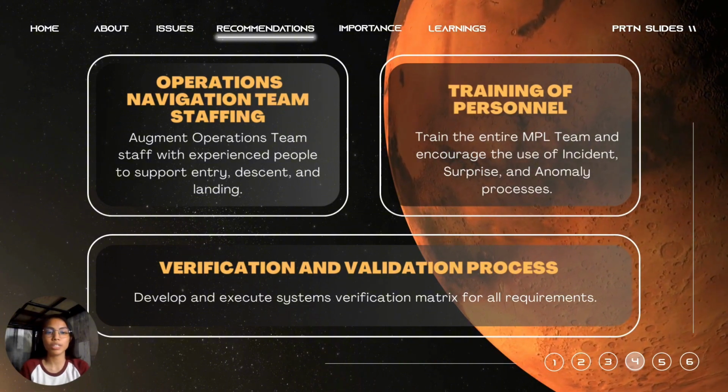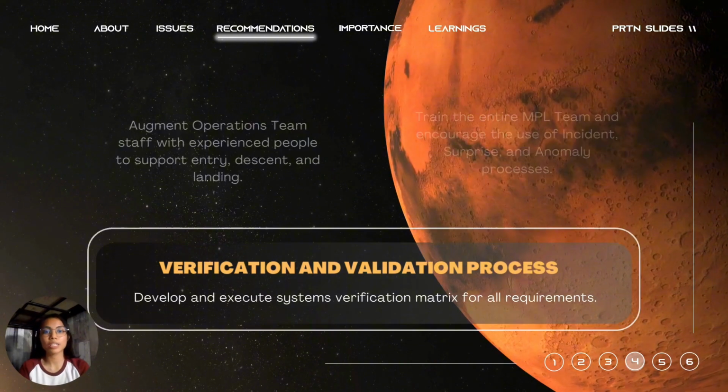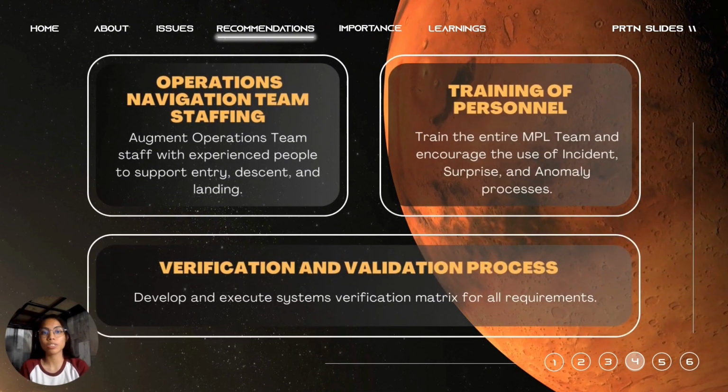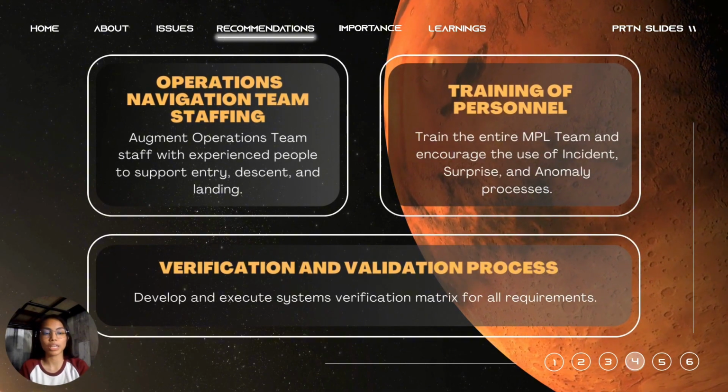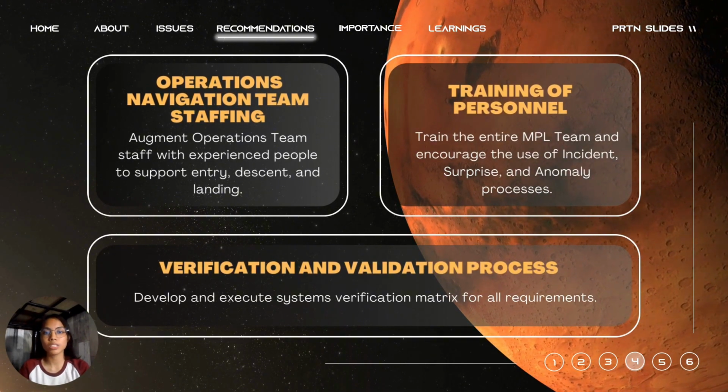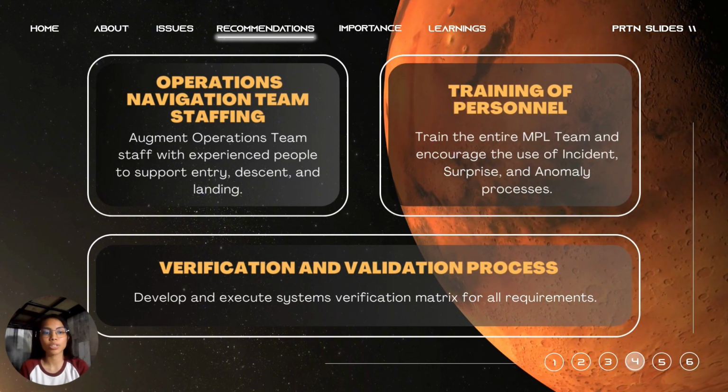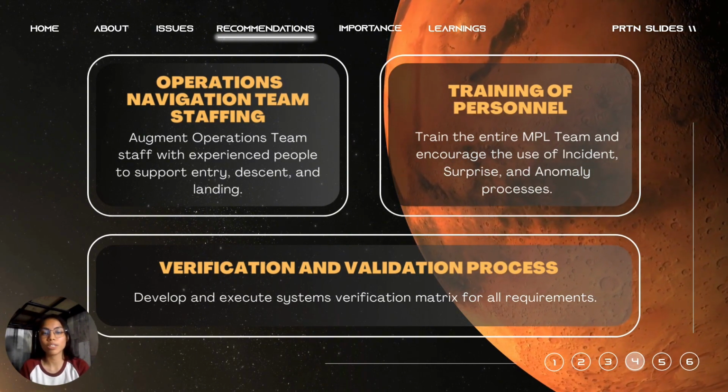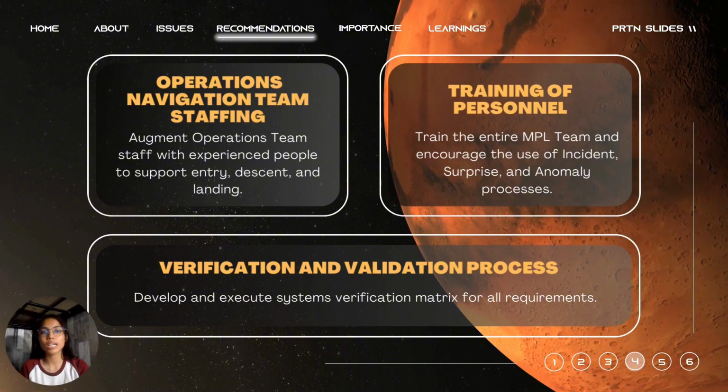Assigning a third navigator and identifying backup personnel for critical roles in case of an ill navigator. Also create contingency plans to ensure the backup of key personnel for mission-critical functions in any project area.